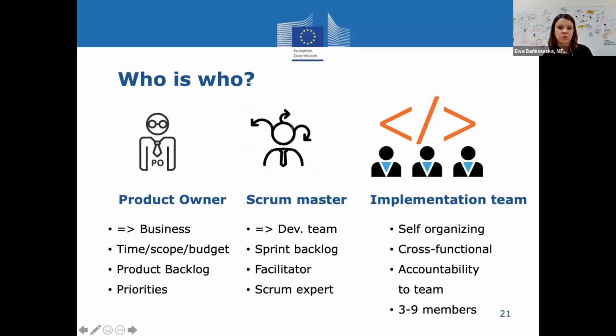Okay. Another question: where would you place a project manager in this picture? If you could explain a bit more, which role would a typical project manager play? It depends how big your organization is. If you really have a big organization, your project manager would be above the product owner. He would actually oversee the product owner, and then he might have several product owners, or he might be responsible next to the product owner for all the implementing. In my case, for example, I'm the project manager and product owner at the same time.